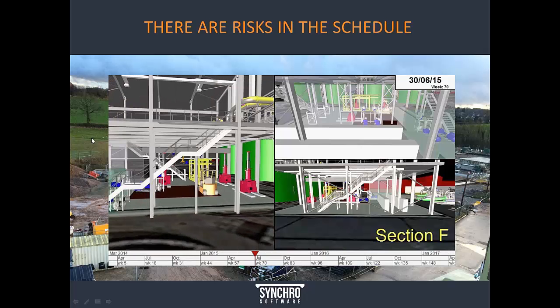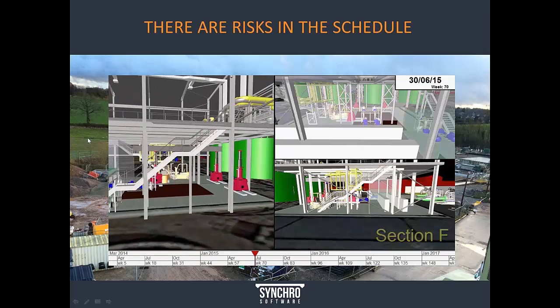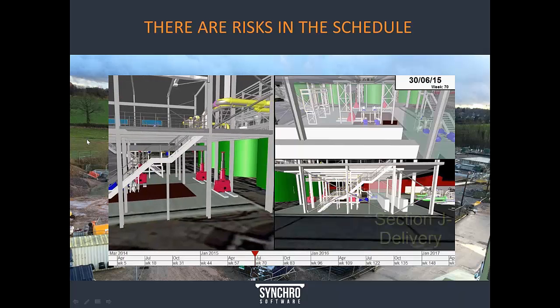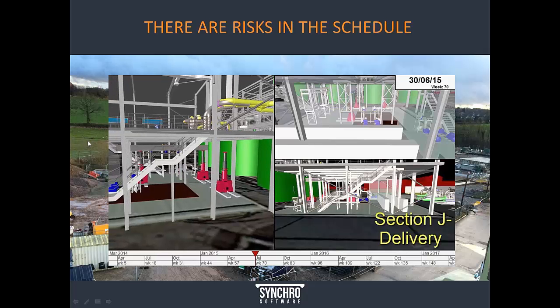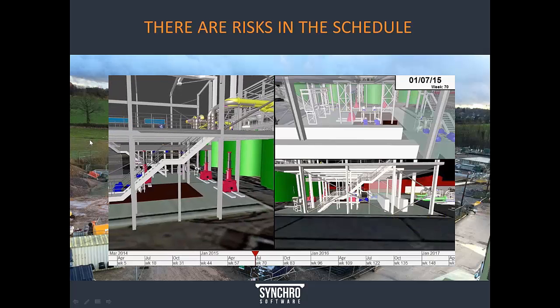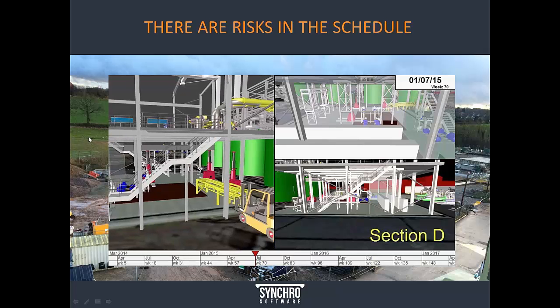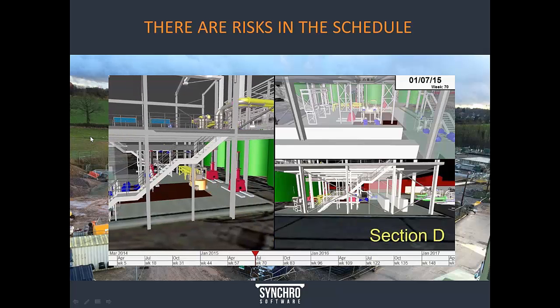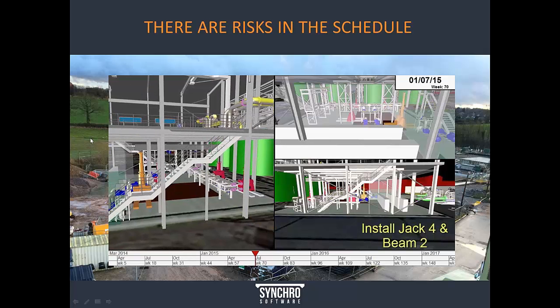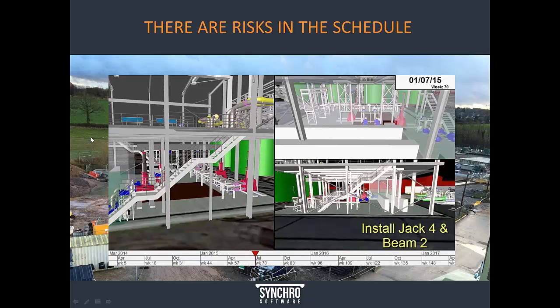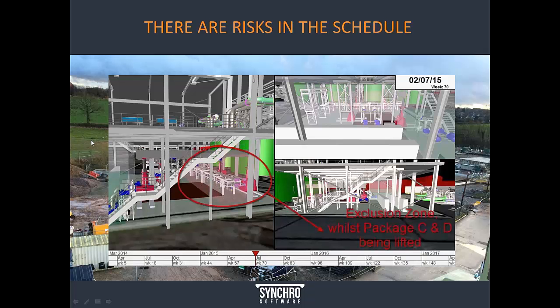For instance, the topic in this case would be prefabrication. Prefabrication is being used a lot more in projects and a lot more in terms of reducing on-site construction work by prefabricating assemblies, prefabricating components off-site and delivering them to the site in a so-called leaner fashion, which is a great practice. But what can happen is that the increased size and complexity of the prefabricated assemblies may prove to be more difficult to install than what is forecasted by the planning team in the schedule.